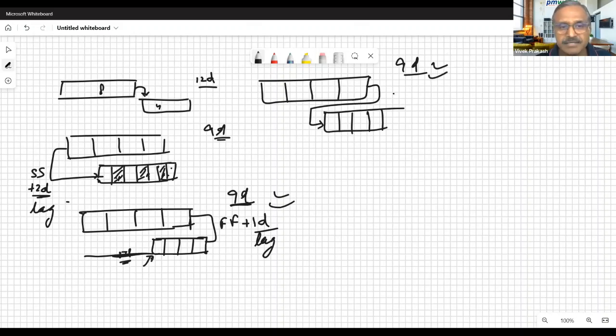What I will say, FS minus 3 days. Now achieve the same thing with FS minus 3 days. Minus 3 days is called lead.